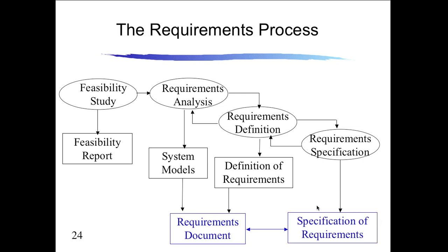And here's how the requirements process should work in a real business or company. You're going to put together a requirements document, a generic form of the requirements. If you were working in a real software development company doing a real 2-year project, you would start out with a feasibility study and come out with a feasibility report. It would get sent off to the management people, and they'd look at it and say, oh, wow, let's build it. Or, no, this is not really good this year, let's wait till next year. So they time it out, they plan, and then they decide, let's build it.